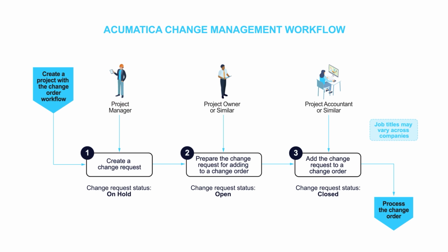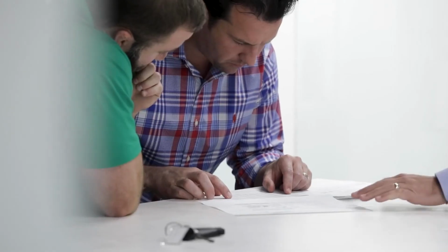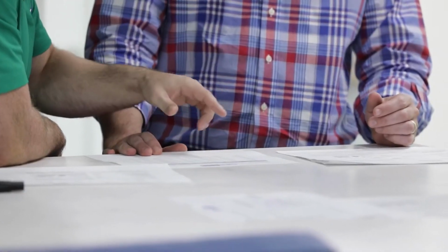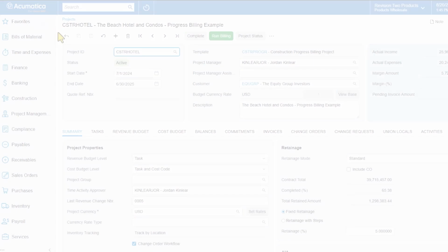Manage changes that impact project revenue, commitments, and budgeted costs. Negative change orders help manage back charges and reduce vendor commitments. Streamline change orders for multiple construction projects with unit rate changes, custom retainage, and cost-only change requests.